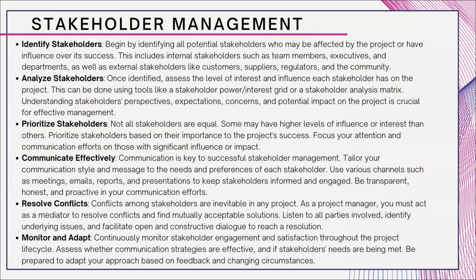One of my projects, one of my stakeholders was the chief people officer and the chief financial officer, and so I was consistently communicating with them. I sent out weekly status reports to let them know what was happening, and we even had other meetings where they received more in depth updates on what was happening with the project. So super duper important on that.